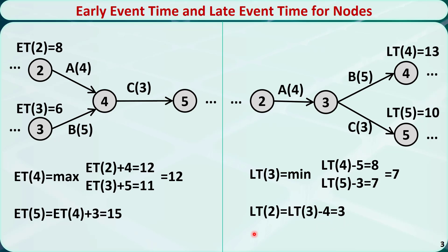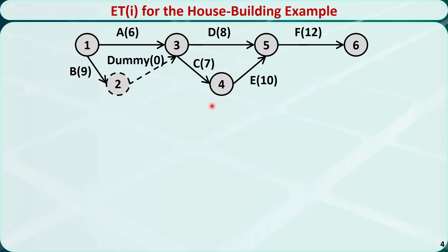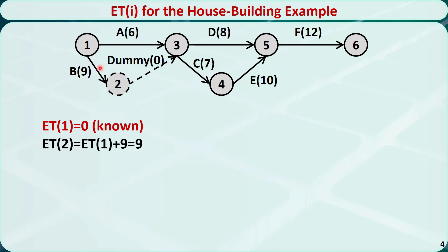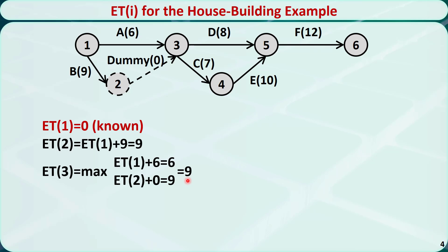After we are clear with the two special cases, let's check the house building project network introduced in the previous video. Assume that we know the early time of node 1 is 0 — that is the start time of the entire project. For node 2, the early time equals the early time of node 1 plus the duration of activity B, which is 9. For node 3, the early time has two options: the early time of node 1 plus the duration of activity A equals 6, and the early time of node 2 plus the duration of the dummy activity equals 9. We pick the larger value, 9, as the early time for node 3. For node 4, the early time equals the early time of node 3 plus the duration of activity C, which is 16.